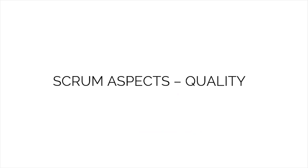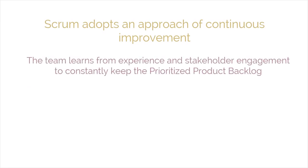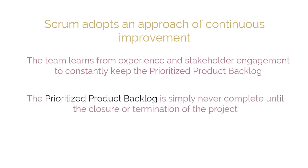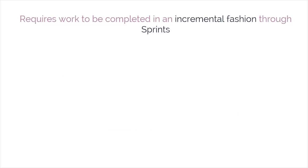Quality is the third aspect we are going to discuss. In Scrum, quality is defined as the ability of the completed product or deliverables to meet the acceptance criteria and achieve the business value expected by the customer. To ensure that a project meets its quality requirements, Scrum adopts an approach of continuous improvement, whereby the team learns from experience and stakeholder engagement to constantly keep the prioritized product backlog updated with any changes in requirements. The prioritized product backlog is never complete until the closure or termination of the project. Through repetitive testing, Scrum requires work to be completed incrementally through sprints, rather than waiting until the end to produce deliverables. This means errors get fixed right away, instead of being postponed until the end of the project.